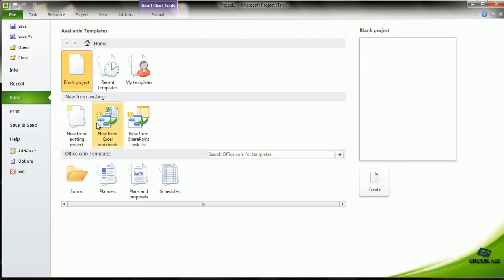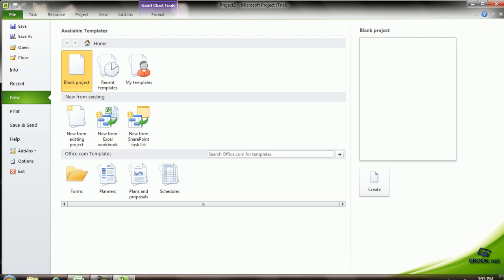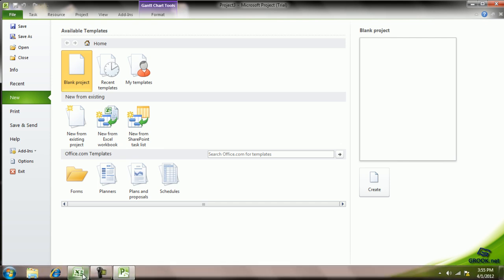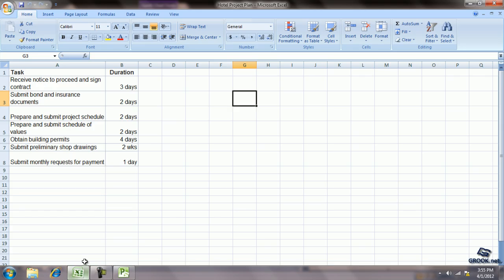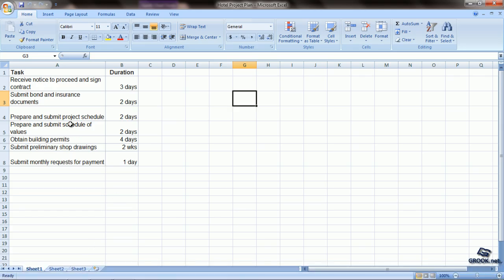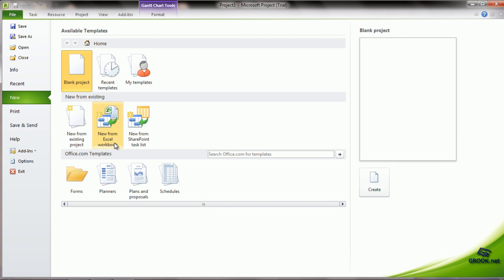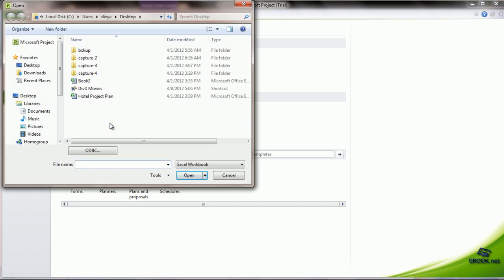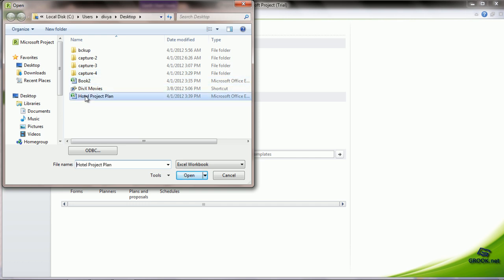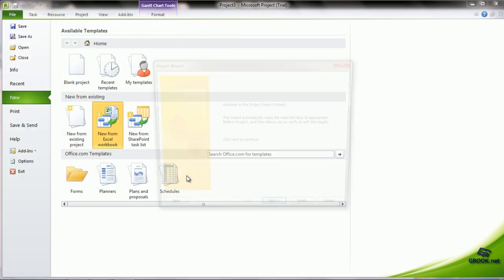The next option is to create a new project plan from an Excel workbook. For example, we have made a small sample of a few tasks in Excel. One column gives the tasks, the others give the duration. Now, if we want to take this to MS Project, we can say New from Excel workbook. It will ask us where is the file, so we can choose that. We say Open.